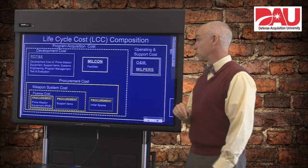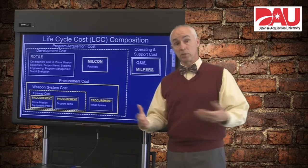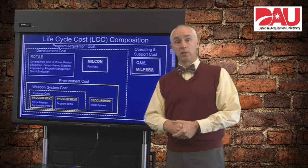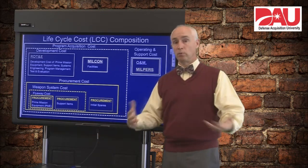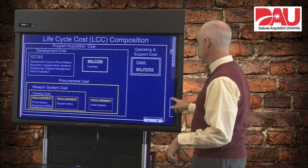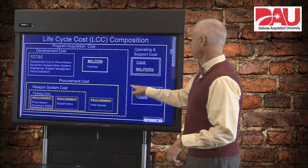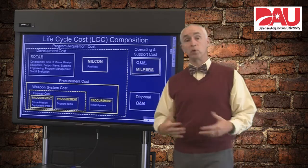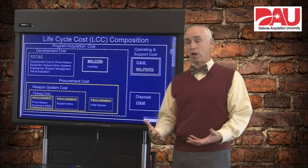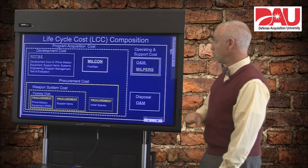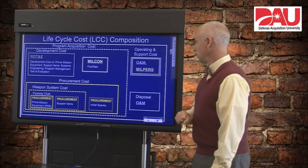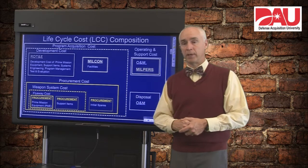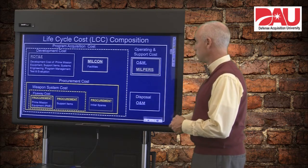And then there's also the very expensive MILPERS, which is basically all the costs of salaries of your DOD personnel — uniformed or not — that work on the system. And then lastly, we're going to have to pay to dispose of the system as well. Disposal costs are usually out of the O&M appropriation, so normally that's what we're going to have to pay out of to do our disposal.